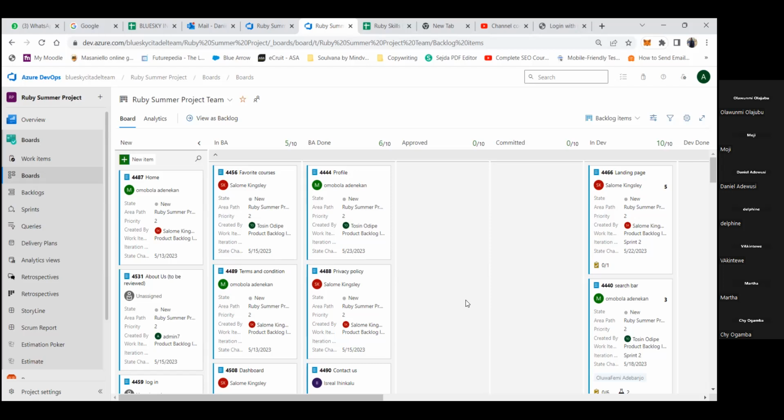Remember, the stories have been written, approved by the PO, and taken into sprint. What we didn't do was finish them. So you take them back into your approved column. You can put them above the stories already in the approved column, so that you've cleared your board for the work you need to do.